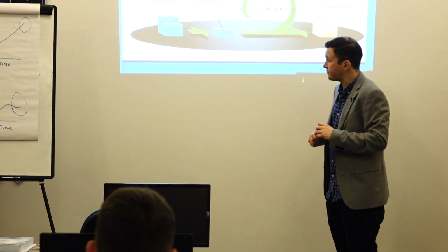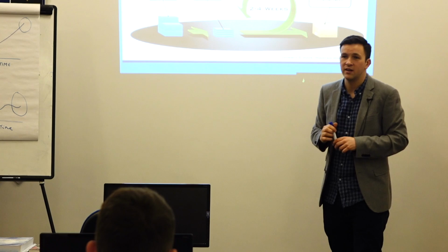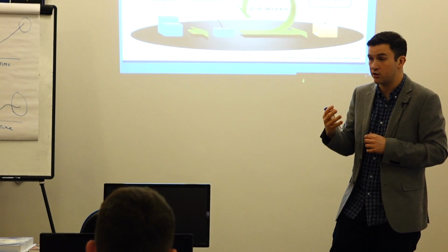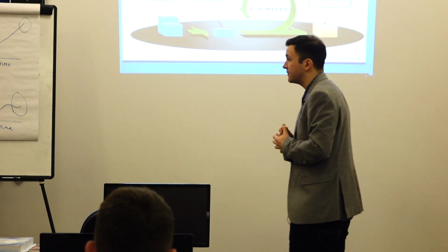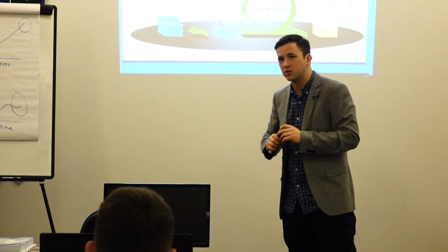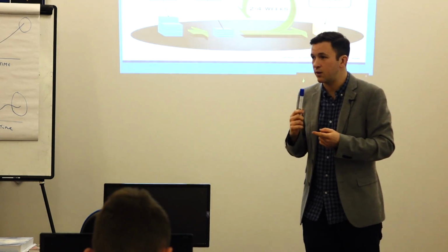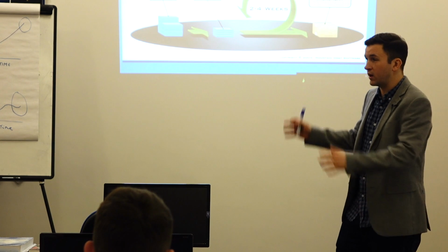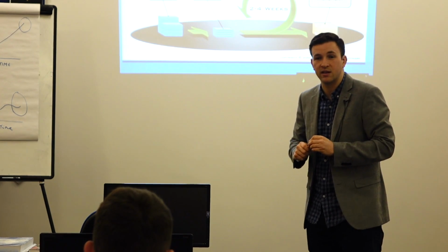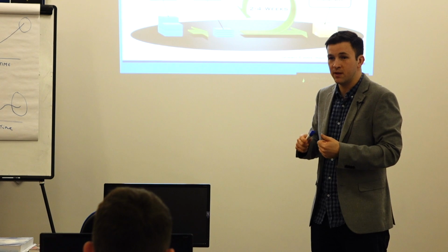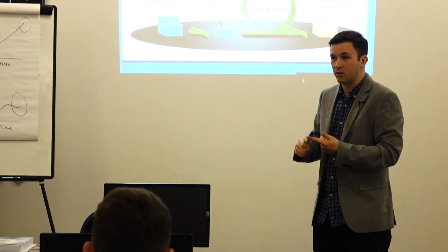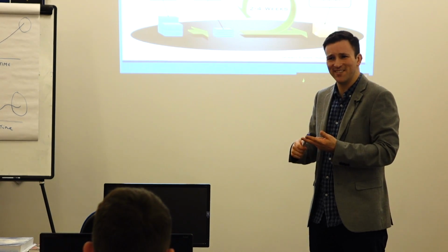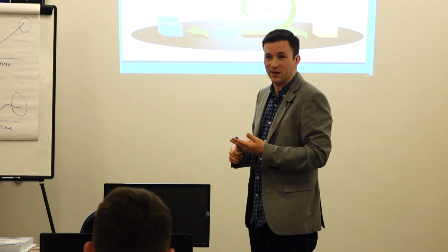Also, this bit at the top, this kind of 24 hours, is in line with the agile principles, we're trying to encourage collaboration and interaction between people. So we have what's called a stand-up meeting, and every day we have 15 minutes where we pull everyone into the meeting room. We have a board with all the tasks we have for that 2 weeks, and in those 15 minutes we go around the room and everyone says what they did yesterday, what they're doing today. What's the third one? Yeah, and if they need anything off anybody else as well.